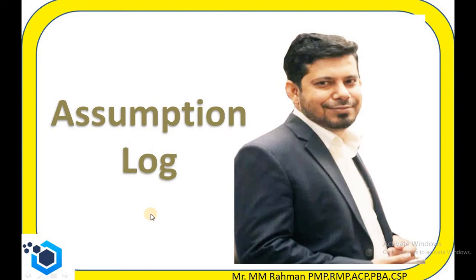The aim of today's video is to describe what an assumption log is and how we can create this assumption log. The assumption log is an output from the develop project charter process. This is a dynamic document that is updated throughout the project life cycle. Assumptions are progressively elaborated throughout the project and eventually are validated and are no longer assumptions.